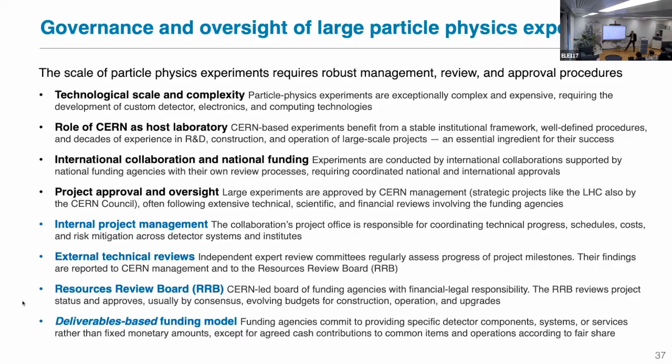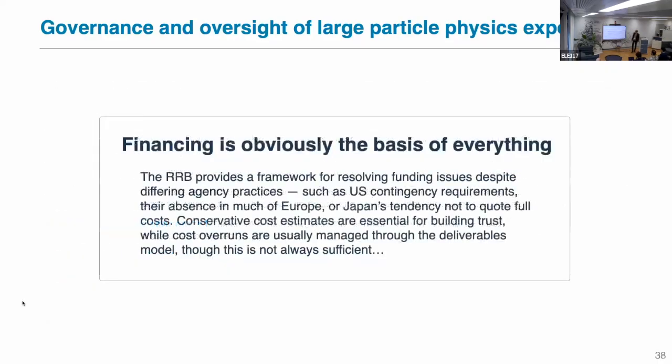So nevertheless, this deliverable principle is very important. You do not negotiate money with the funding agencies. You always negotiate deliverables. Okay, so finance is obviously the basis of everything. So the RRB provides the framework for resolving funding issues despite differing agency practices, and they're quite different.